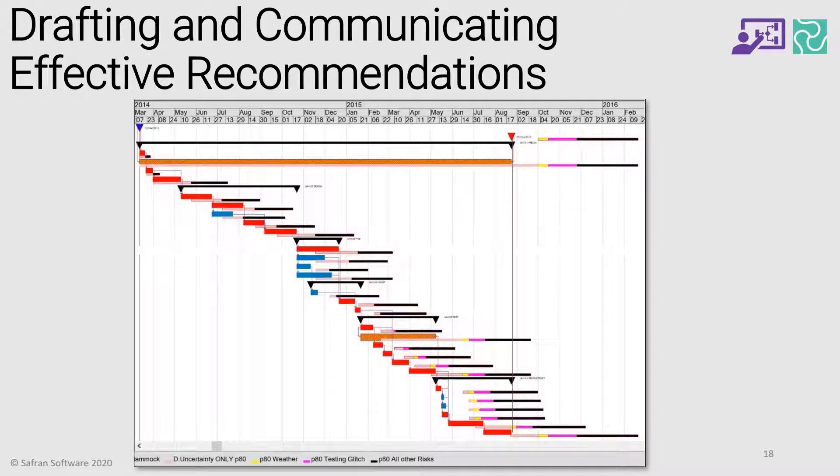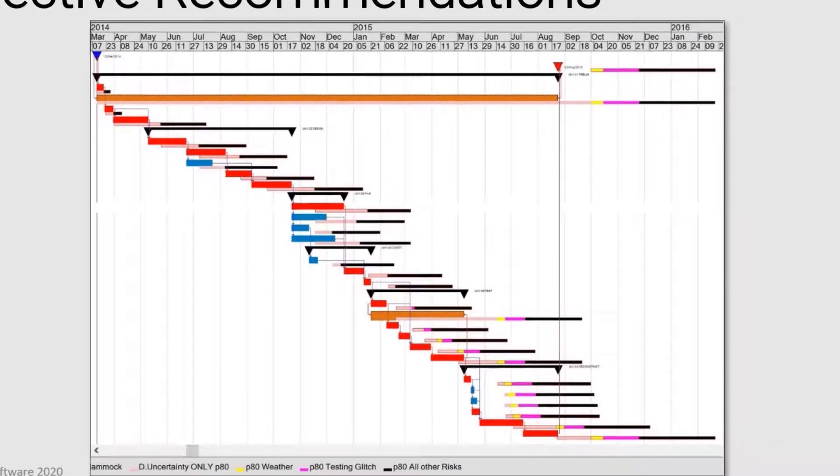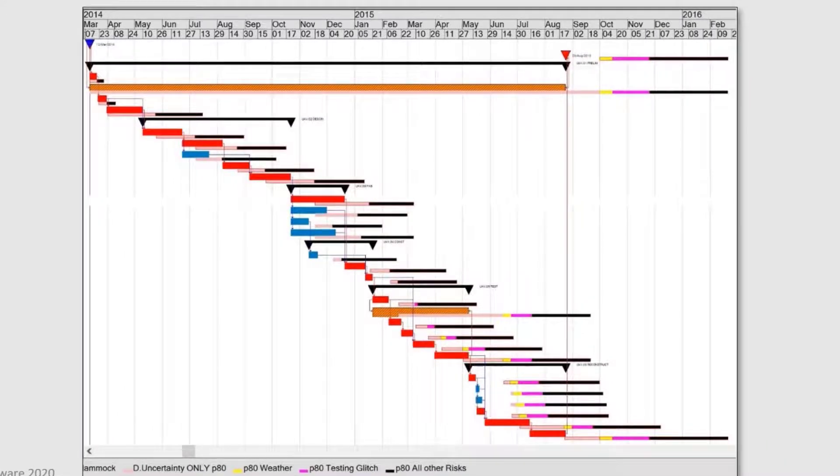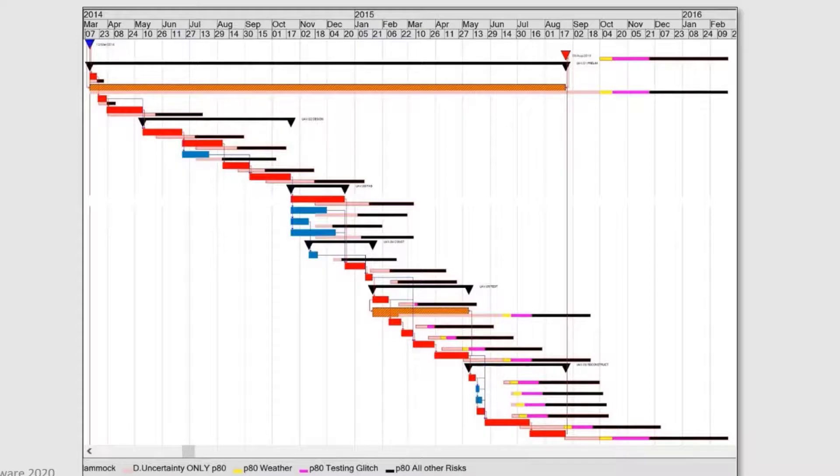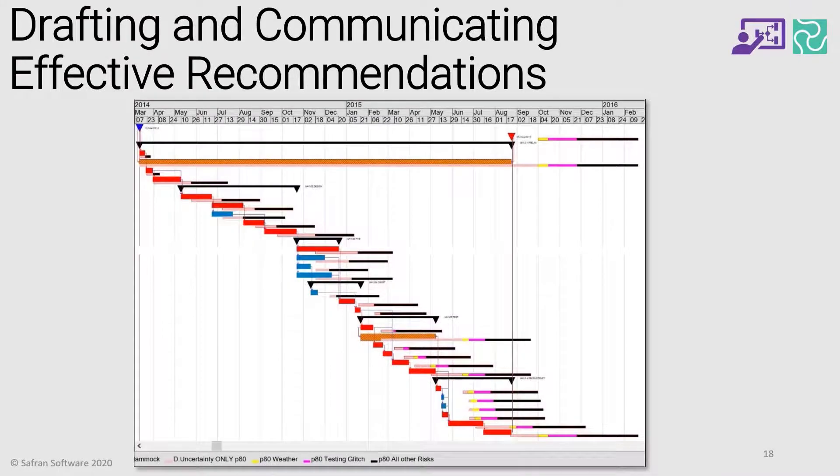Another means of effective communication, perhaps for a broader audience, is to be visual. It's very easy within Safran Risk to create your own custom layout. So it's very easy to run a what-if with certain risks switched on and recording the various risk-adjusted positions within spare user-defined fields to draw additional Gantt chart visuals. And here I continue with the example of the pre-mitigated weather downtime and testing glitch risks at P80 confidence, yellow and hot pink, respectively, as well as the underlying estimating uncertainties of activity durations, which is in the salmon pink color. And all other risks from the risk register are then shown as black bars.